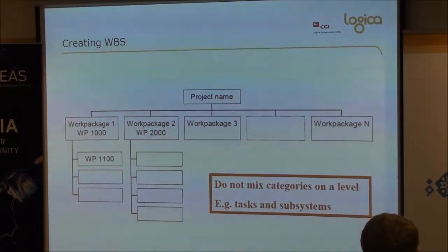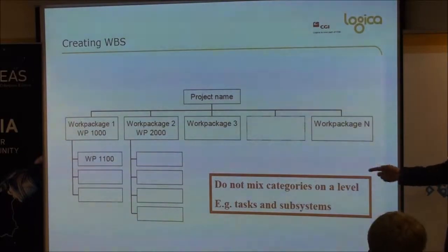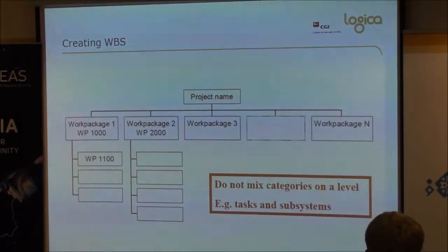That's fine. So the first thing you do if you're priming a construct is to assemble it and mark which work packages you expect the subcontractor to do. Just don't team for the fun of it or because you've got some kind of relationship. You must be able to justify that. And there's a proposal in which you'll do that later, and I'll come on to that.